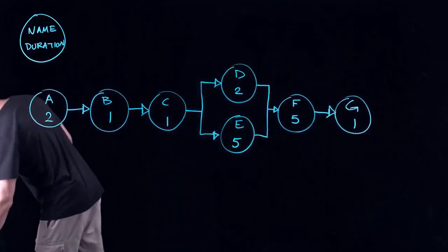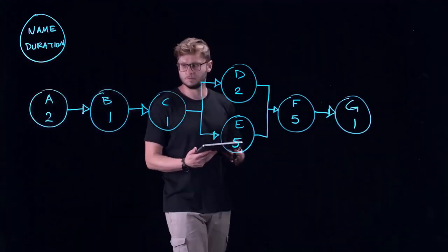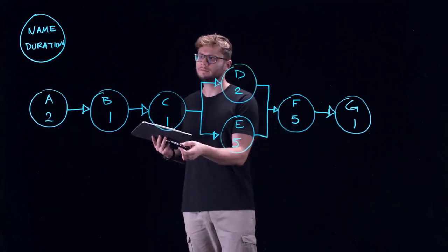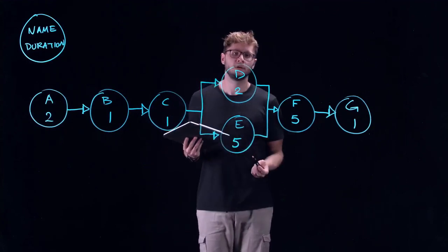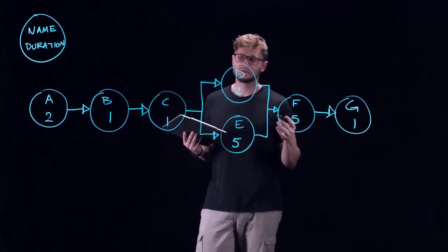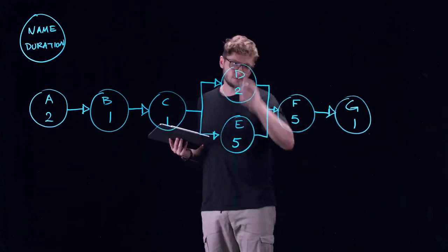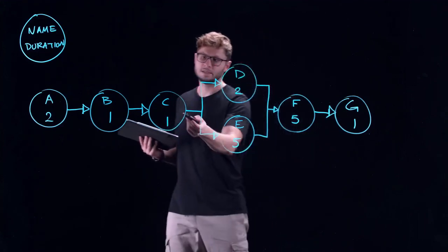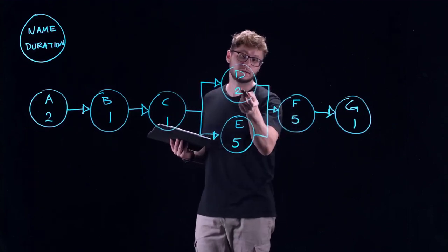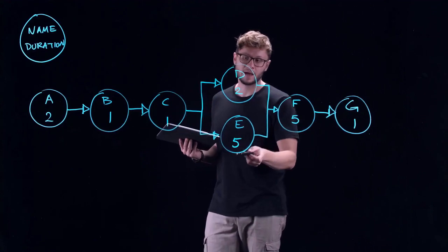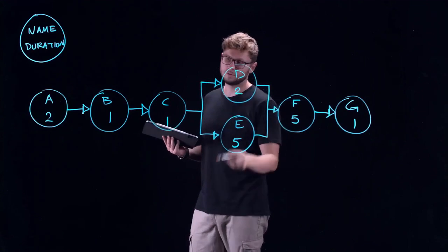Now, what we need to do here is find the critical path. The critical path is, once again, to reiterate, the path that we should take to ensure that all activities have all of their prerequisites done before they get started. For example, in the case of activity C, we'd have to have finished activity B. In the case of activity F, we'd have to have finished both activity D and activity E, but the path can only have a single trajectory through intersections.